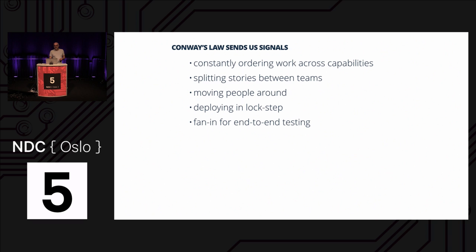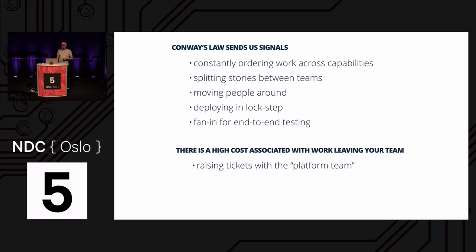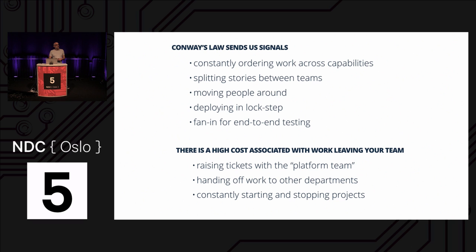And finally, high cost associated with work leaving your teams. So if you're raising tickets all the time with a platform team, right, that's going to impede your progress. It's going to slow you down. Handing off work to other departments, an order of magnitude increase in cycle time. And if you're constantly having to start and stop projects, that's another high cost.